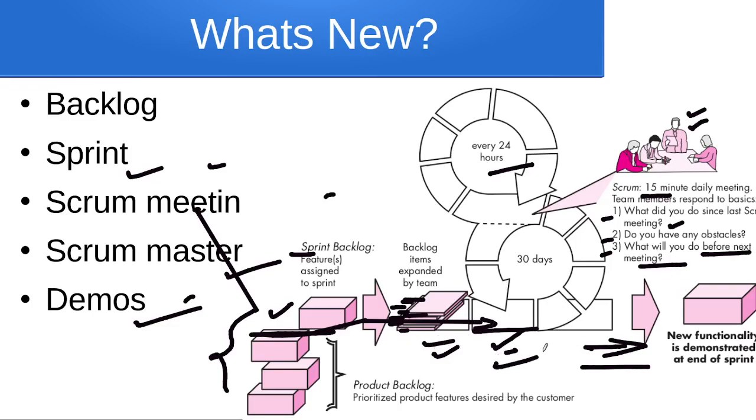So, these are the few things about your Scrum. Here you have to understand mainly that a Scrum is an agile process, and also that there is a backlog which gives the stories which are already ranked or priority is given, and you make a sprint which has the work units that are required to achieve a requirement defined in the backlog, which must fit into a predefined box. Maybe it is 30 days, sometimes it may be 15 days or 7 days also.